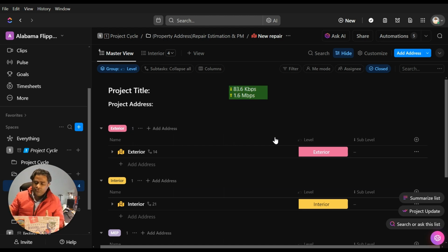And from those levels, they want to select the relevant items, and then they want to calculate the budget and estimate the budget while comparing it with the actual cost. The second challenge was that my client divided those tasks into multiple levels, starting from the top level and going down to fifth level, and they wanted to estimate their budget at the last level while they want to compare that budget and actual expenditure at the second level of the template. And moreover, they wanted to create the project management system again at the second level. So this was a challenge, and you can see what I have done.